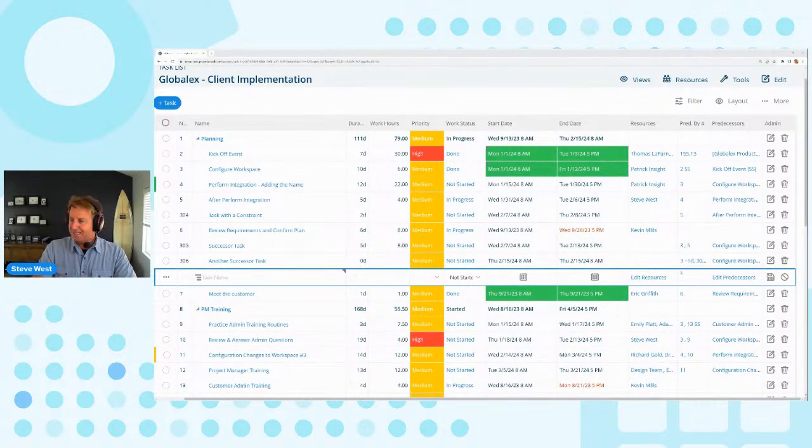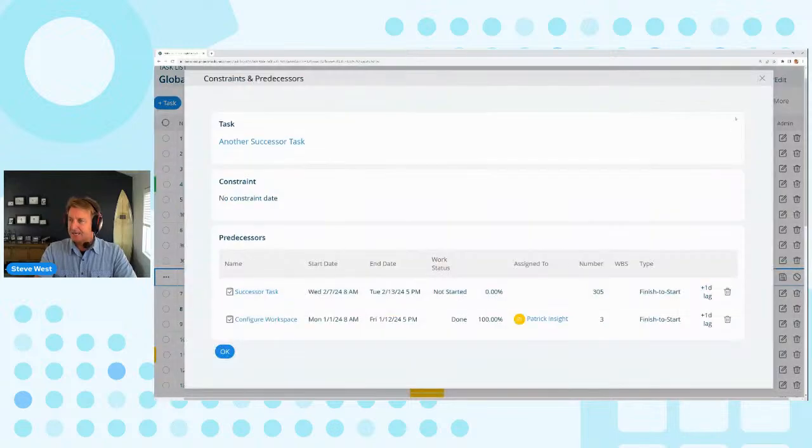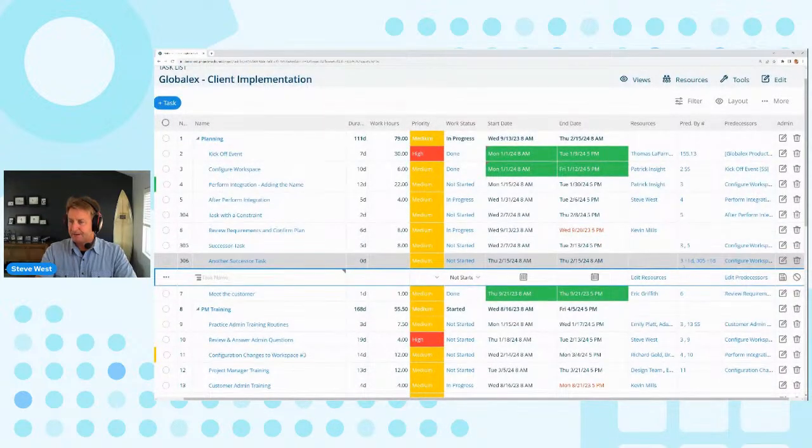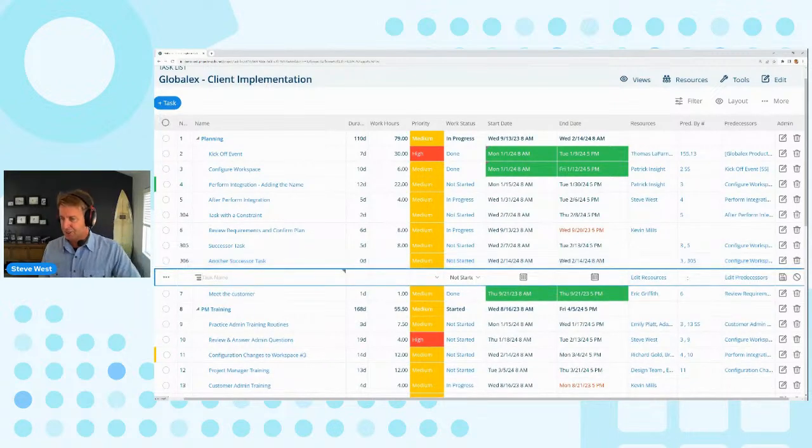I know I'm running short on time, but you can see too, there's notation in here for the predecessors. So 3 + 1, like that number, these tasks there, I can click on here and see them. If I double click here, I can actually take out that +1 day. And then I can also use the notation that's like Microsoft Project, SS, start to start, FF or finish to finish, but the common way, finish to start, is just putting the number in without any notation, and that will do it.